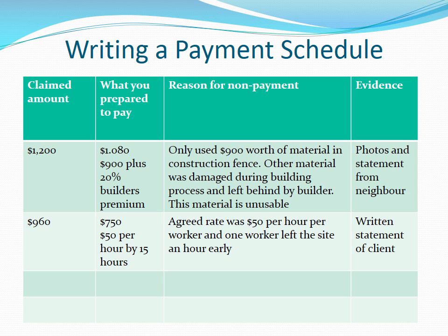If you have overpaid this builder $50 on a previous job and the builder said you could use that credit on this job, you would list this separate to the above table as it is not a reason for non-payment. You obviously can use it to reduce. You agree you are liable to pay, but you are claiming you have already paid $50 as evidenced by the credit note.